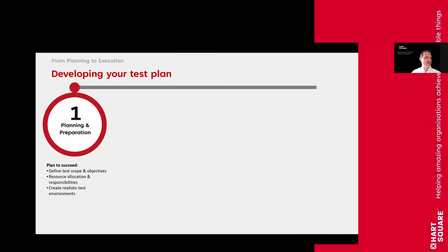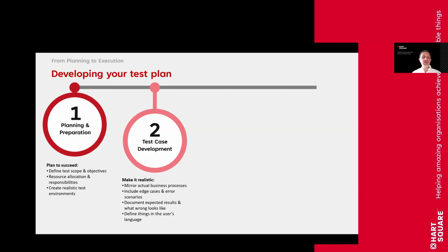And what I mean by that is if you're going to have a UAT environment, understand the parameters around that UAT environment. Is it going to be used for data? Are you going to be testing on live data? I really advise that you don't do UAT testing on live data, but if you have to, because of the way that the plan has been developed, then have a mitigation for dealing with that. But it has to be realistic and it has to be pragmatic for weeding out the type of scenarios that you need to find.